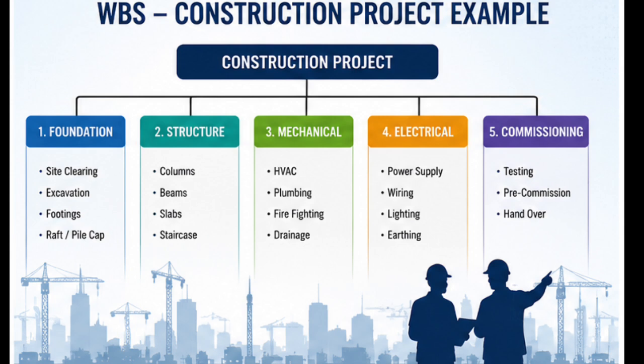After pre-construction, it will be the construction itself. If it is a multidisciplinary project, you need to divide the construction further based on your area. There could be different units or different buildings you're going to construct, so you may need to go for the different process units. Then you can further divide it into civil, mechanical, electrical, instrumentation, all those kinds of things. You can group it under that. Landscaping works could also come under your construction.